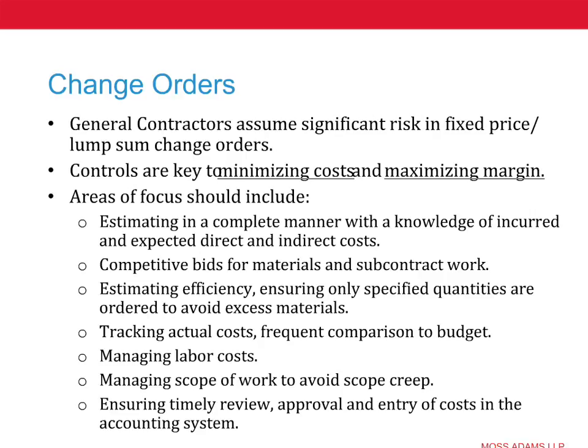It's a very frequent subject of our audits, both for the owner, and we have also helped contractors with their controls around change orders. I think one of the main reasons change orders can be a challenge, as Curtis was mentioning earlier, is you have a contractor that is typically negotiating a contract based on competition. That may be their typical way of approaching contracting, as is very frequently the case. They then are in a situation where they have a change order arise, but they may not have the systems in place that can really come up with good cost estimates to be able to price that change order.